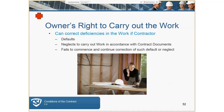The owner has the right to carry out the work and can correct deficiencies if the contractor defaults or neglects to carry out the work in accordance with the contract documents. The owner has the right to self-perform the work or correct deficiencies. However, there is a formal written notification process required 10 days before the owner takes responsibility, giving the contractor a cure period.